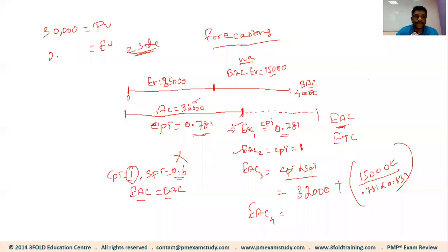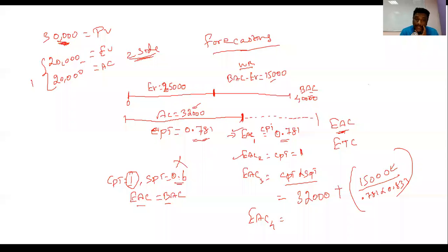So the earned value will be 20,000, because you completed only 2 sides of the compound wall. And you spent exactly 20,000 only. Which means the CPI will be 1, because the money you spent is as per the progress. Fine. But you are behind the schedule. You're supposed to complete 3 sides of the compound wall, but you completed only 2 sides. Does it make sense, Emil? If that is what you're asking. Your CPI can be 1. Your CPI can be even greater than 1, where your SPI could be less than 1. Does it make sense to everyone?